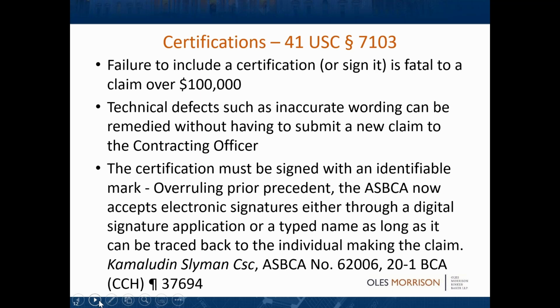it can count as a signature for the purposes of the CDA, through a digital signature, of course, signed in ink, or if it's a typed name, but it can be traced back to the person who, for instance, sent the email. But up until 2020, people were getting their appeals dismissed because they signed it with a digital signature on an email block. And again, 3 years into the litigation, the board said, well, it's not signed. Because it's not signed, it's not a certification. But it came from my email address. But that's how the government fights these things, ladies and gentlemen. They're going to try to find that you didn't submit a claim.